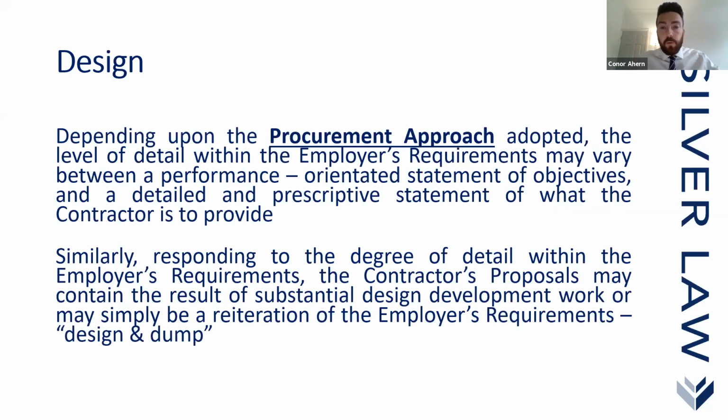Depending on the procurement approach adopted, the level of detail within the employer's requirements may vary between a performance-oriented statement of objectives and a detailed and prescriptive statement of what the contractor is to provide. Similarly, responding to the degree of detail within the employer's requirements, the contractor's proposals may contain the results of substantial design development work, or may simply be a reiteration of the employer's requirements.